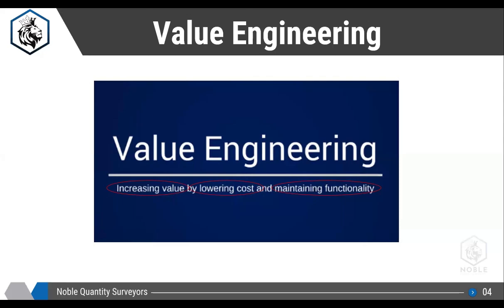Okay, so with value engineering you also have to think about where to apply it, because it cannot be applied to all types of projects. We have so many types of projects: commercial, residential, hospitality, schools and all. For hospitals, schools, and many buildings, the client will not compromise on the value. So there you have to use the same material the client or consultant is asking for. But you can propose value engineering for options where it is a residential or commercial building. There you can propose the alternate material. We'll see later what alternate options we can do for mechanical works.